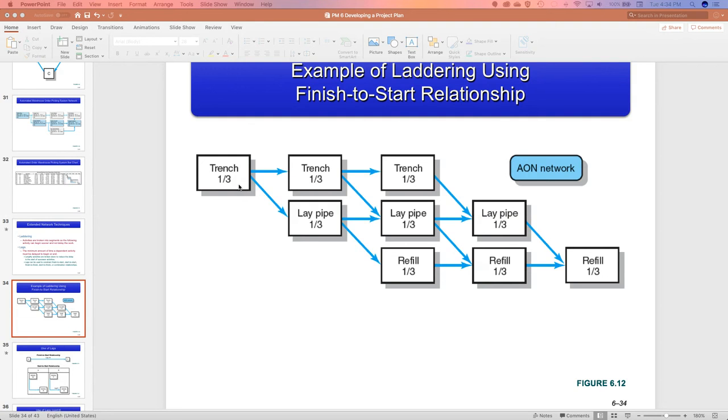All right, now, if, however, we practice a laddering effect, we can now look at the trench is going to be done on the first day. When we dig, right, so when we dig the second length of the trench, we can also lay the pipe, right? So far, so good? So while the total amount of quote unquote personnel we need would be 9 days, we don't have to wait. While the trenching crew is digging the second length of the trench, the pipe crew can lay the first length of pipe. So far, so good? Tiana, does that make sense?